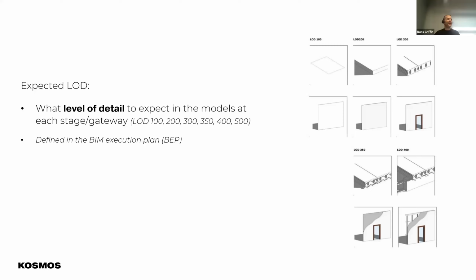Yeah, no, I can understand where you're coming from. That's theory versus practice. It's not reality, because what you'll notice in an architectural and structural delivery is that in those early stages, they can get to an LOD 300 much quicker than the services can, because simply the services are not designed in those early stages. The engineers will not approach a ventilation system at that very early stage.